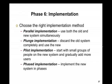The plunge, or direct turnover, is the exact opposite — you discard the old system and replace it immediately with the brand new one. Risk-averse people don't like that one, because if it's an accounting program and the new system is broken and you've taken away the old one, nothing is getting done. However, if the new system works great and you've tested it properly, you immediately get everybody up and running, you have one source of data, no confusion, no duplication, and you find the bugs right away. You can't do this with high-risk applications like bank teller systems or ATM applications.